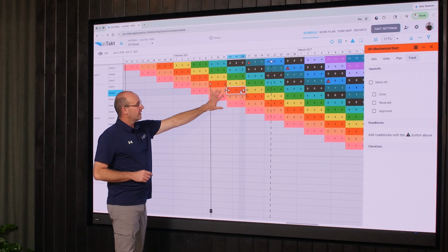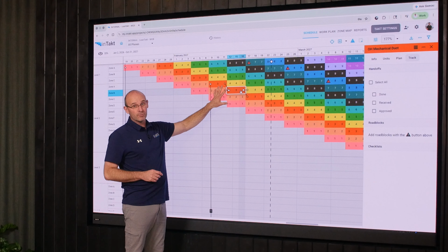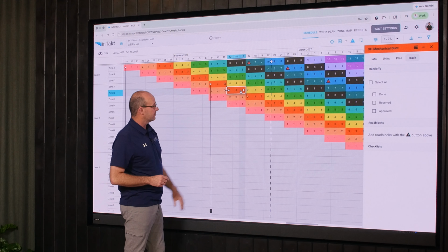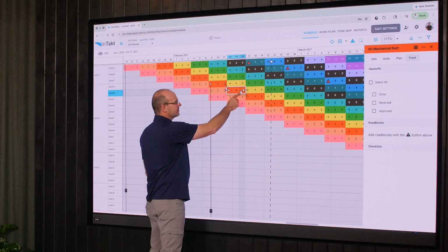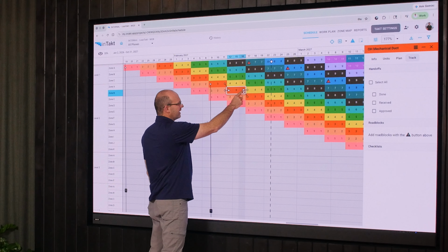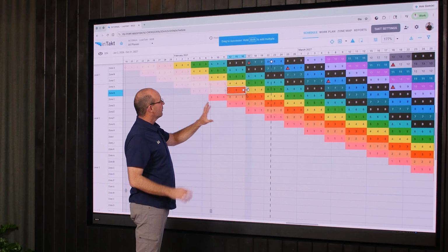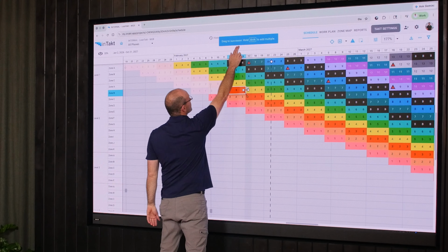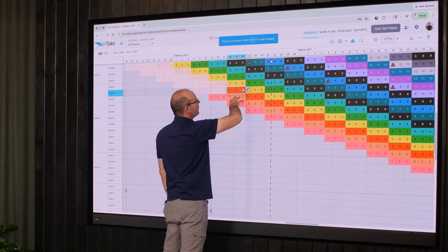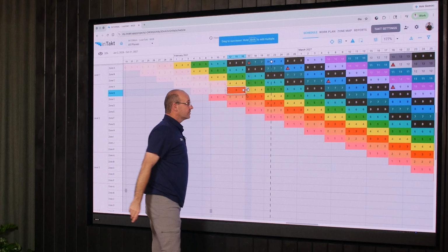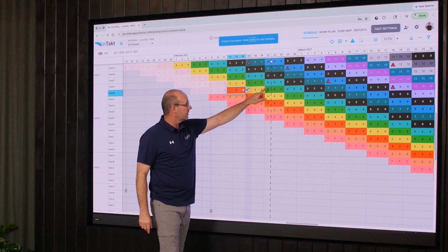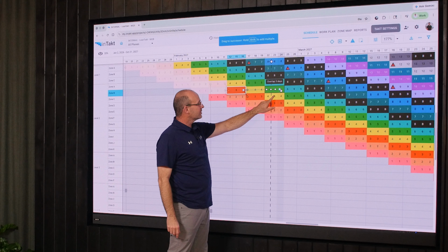Now this is all very easy and automatic. We wanted to replicate the easiest software applications. So Danny will take his cursor and left click and click on this node right here, and you'll see it goes into a mode for linking. And it says drag to your successor. And if you want to add multiple, you hold shift. So he's going to pull this out here to another activity, and watch what happens.